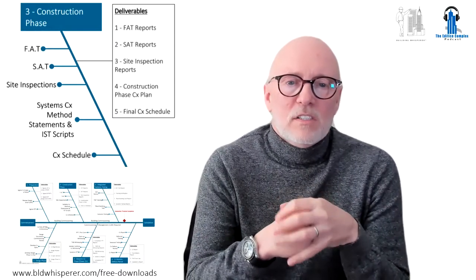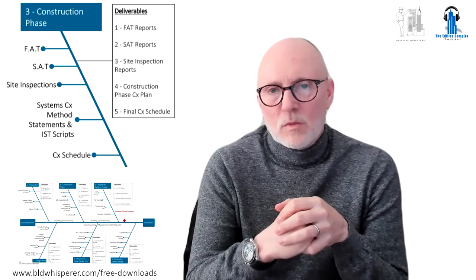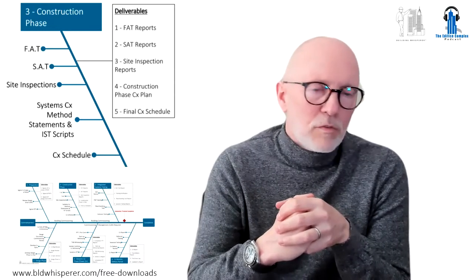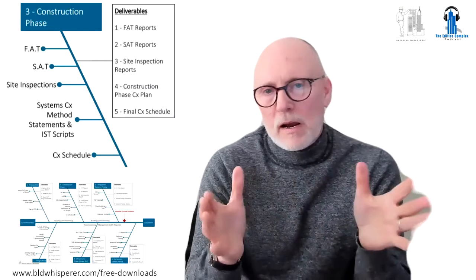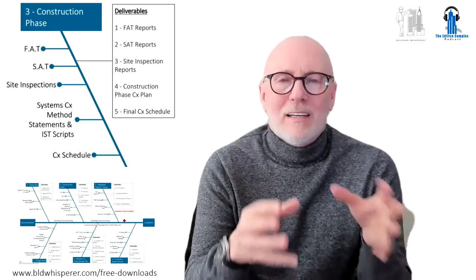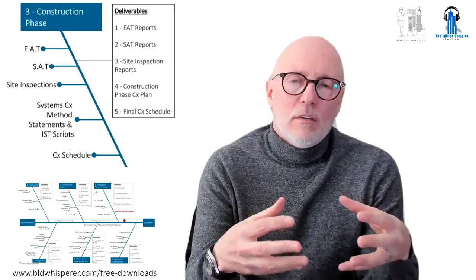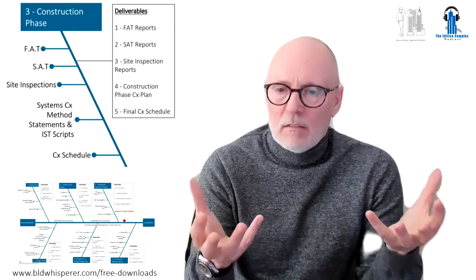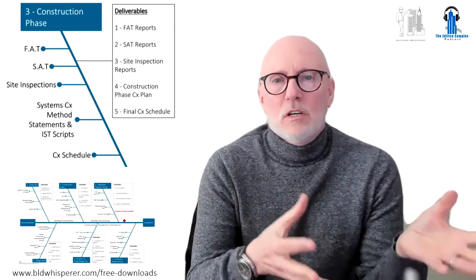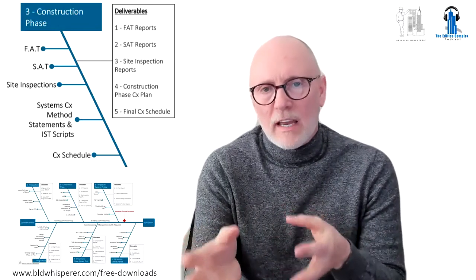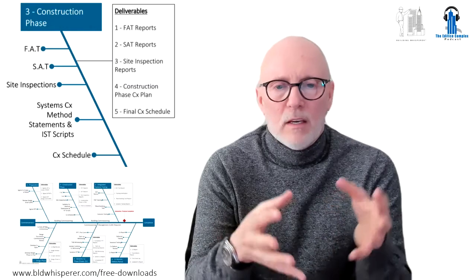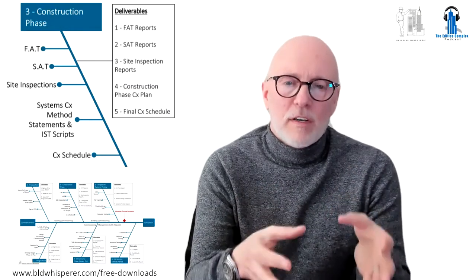The third task is site inspections for commissioning issues. What that means is I'm going to come to your site maybe 3 or 4 times on the run up to power on, and I'm going to walk the job. If I see any issues that are wrong or incorrect, I'm going to let you know about it, and we're going to fix those issues early rather than find them towards the end of construction prior to substantial completion. Any issues found early can be fixed cheaply.